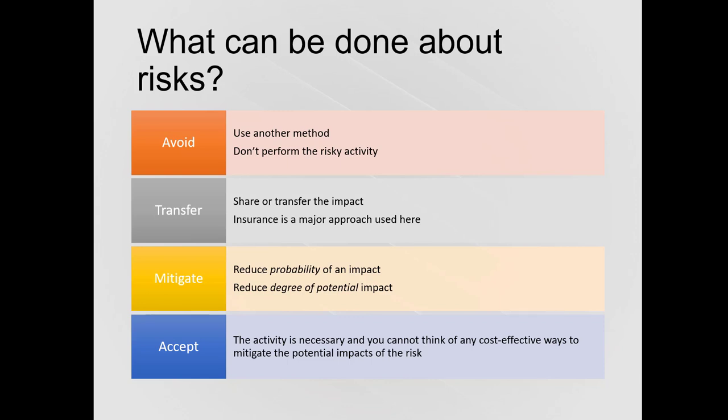So when you're planning a project, risks are still uncertain. They haven't happened yet, but eventually some of the risks that you plan for do happen, and that's when you have to deal with them. There are 4 basic ways to handle a risk. Number 1, avoid it. The best thing you can do with a risk is avoid it. If you can prevent it from happening, it definitely won't hurt your project. The easiest way to avoid this risk is to walk away from the cliff, but that may not be an option on this project.